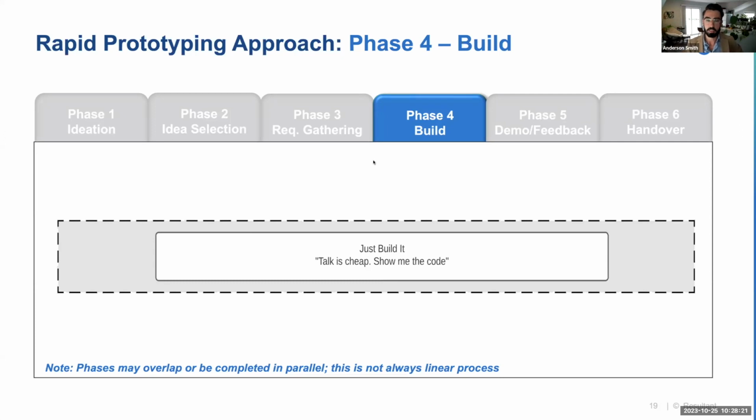This build component really changes depending on what type of project it is that we're solving. Oftentimes, if we're working on a project, for example, that uses sensitive data, so say it's a project in the healthcare space, we may just for the prototype use synthetic data or mock-up data just to accelerate things, since that can really get us through prototyping in a much more accelerated manner, as opposed to having to deal with some of those slowdowns as far as getting access to data, standing up a secure environment, which of course are items that need to happen before a production build out and before interacting with any sensitive data. But due to that strong bias towards action with a rapid prototyping project, oftentimes we'll work with a partial set of data as far as what's available or with synthetic data.